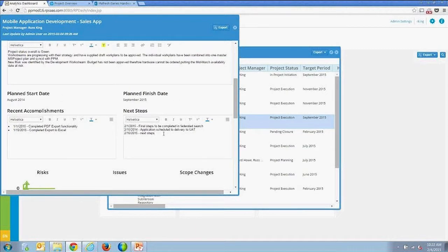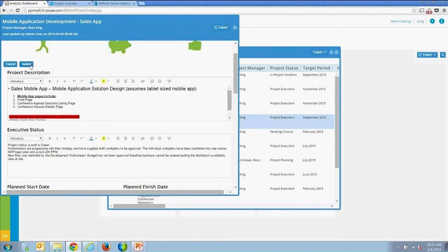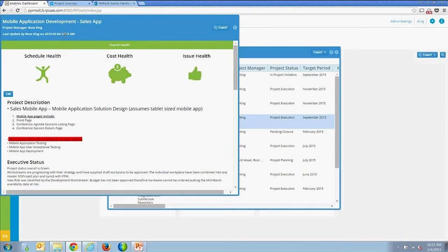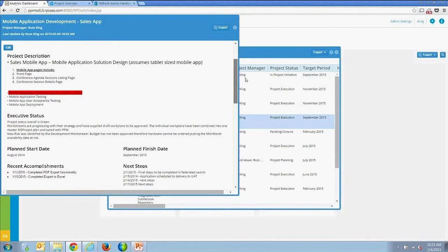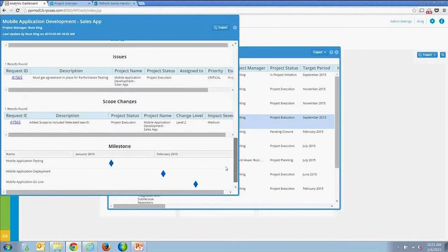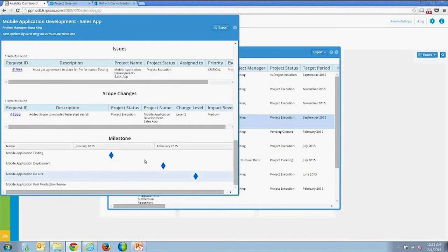You can add additional content and update it — and you'll notice the last updated timestamp changes. We keep multiple versions of the project status report within the solution. The editable section includes schedule, cost, and issue health, plus an overall health status, a configurable unlimited set of fields, and then risks, issues, and scope changes — the same tables you drill into elsewhere.